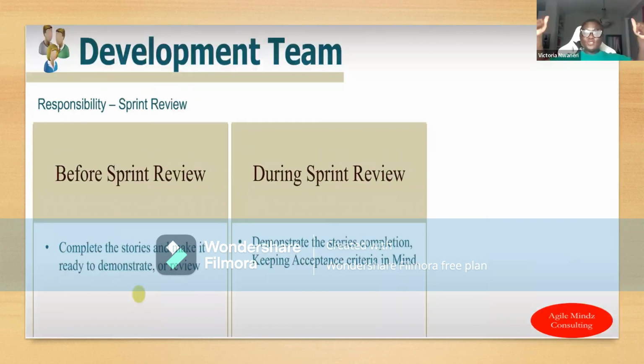All right. When it comes to sprint review, this is where I feel like it's time for them to shine, right? Demonstrate the work that they have done. Oftentimes, before sprint review, they should go through the story, update their story, and ensure that the story is actually ready to be demoed. And if it's not, they need to communicate that, right? And then, of course, prepare for their demonstration, because during the sprint review, that's when they will demonstrate the actual work or functionality that they've built, and ensure that the functionality meets the definition of done and the acceptance criteria listed,